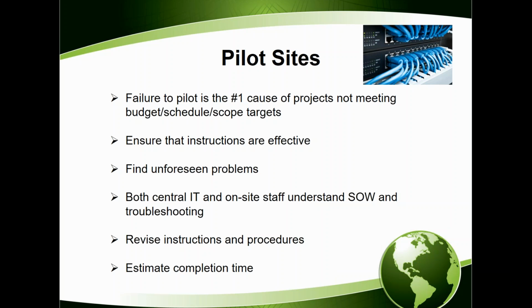Too often, people create time expectations on projects based simply on budget. They say, well, we can afford 100 hours of field time for this, and it's 100 sites, therefore it should take an hour. And I will be honest with you, whenever somebody comes to us and says it should take this long, my antennas go up, because what something should take, which is to say what you would like it to take or what we would hope it would take, and what it takes in the real world can be very divergent.